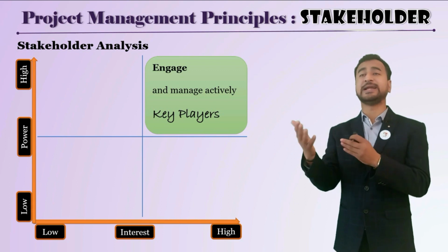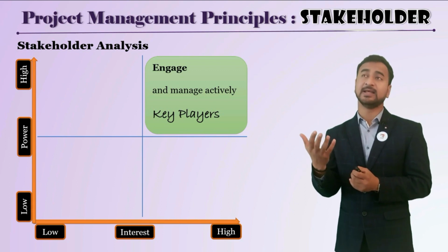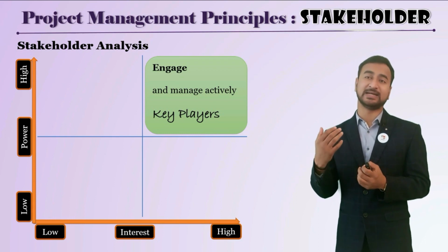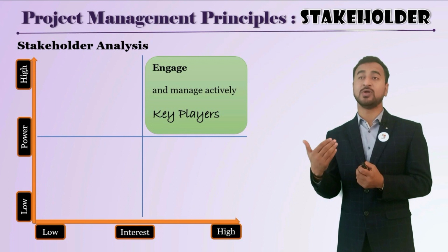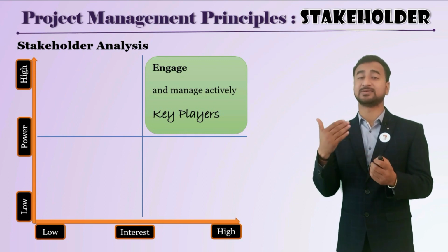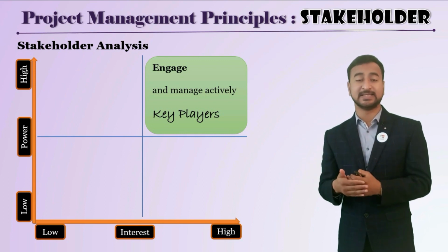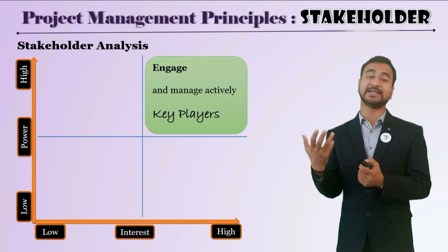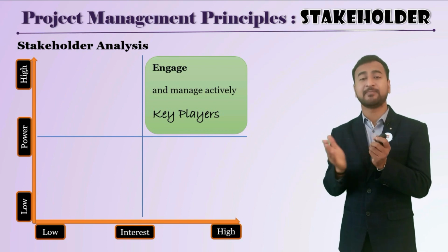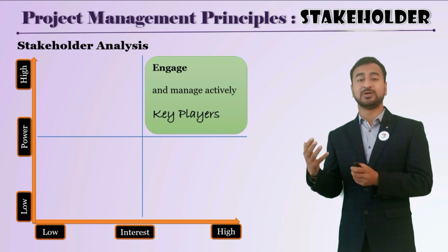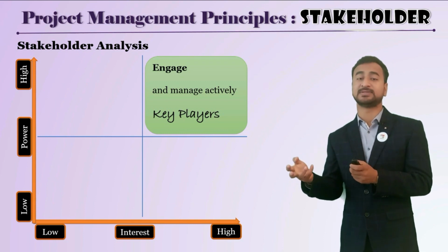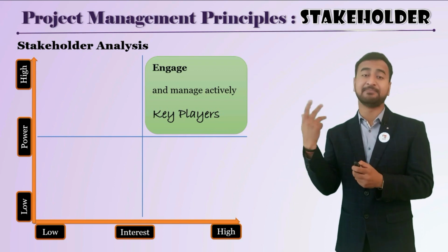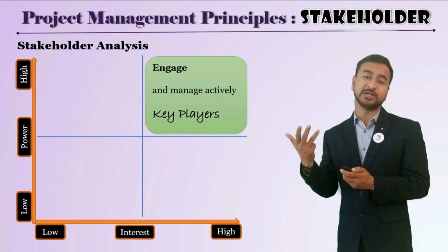And certain direct or indirect stakeholders are also there, apart from your project. In the COVID pandemic, we observed that government played an indirect role. They came up with laws and regulations like quarantine and other things, by which they indirectly influence your project. So that is an indirect stakeholder, and it is possible the type of stakeholder may change from time to time. Right now, in the beginning they are positive, at the end they might be negative. So all these things you need to take care of.